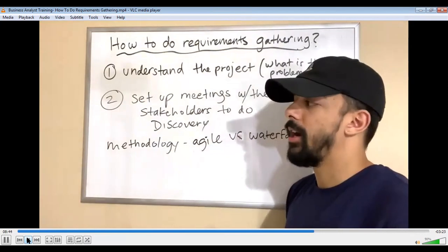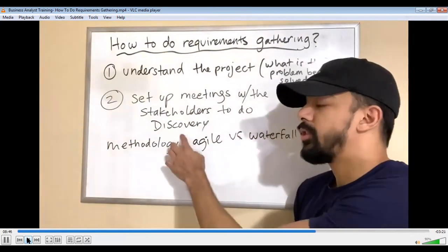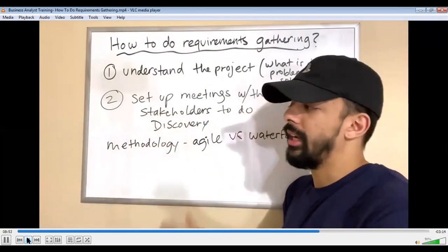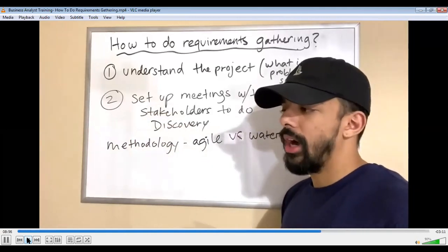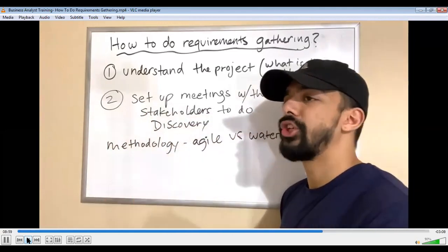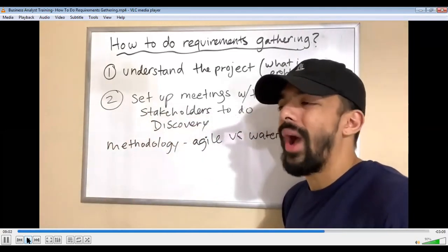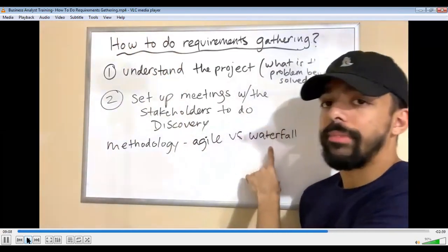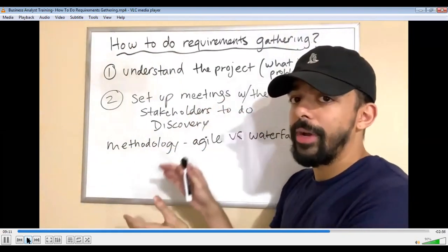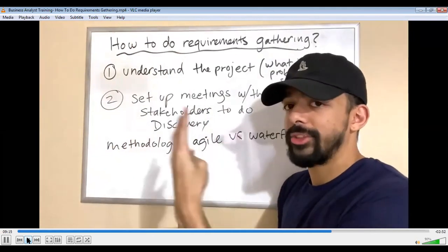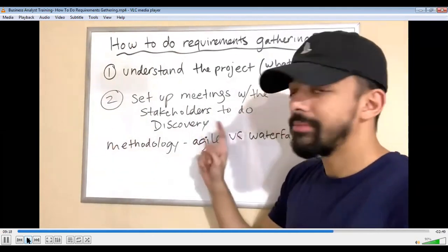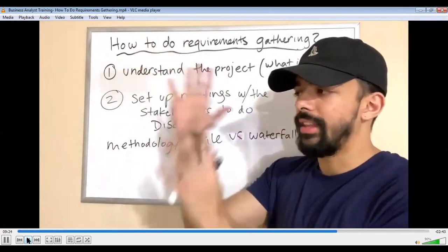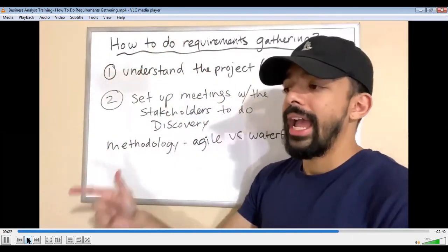And depending on this, this is really going to help you out, because what you're trying to do here, not just obviously understand all the requirements and capture every single one, you're trying to lock down the scope. Because here's the thing. In an Agile format, making sure the scope is locked down doesn't have to be as strict and stringent, because you've got multiple sprints where you can make multiple changes. But in the waterfall methodology, once they said, we're adding 3 buttons, and then the business comes back and says, no, we actually want 4, it's going to be tough to change it. So that's why I'm saying you want to make sure you ask all the right questions, so that the business knows that these are the requirements that you laid out to me, and I'm capturing those.